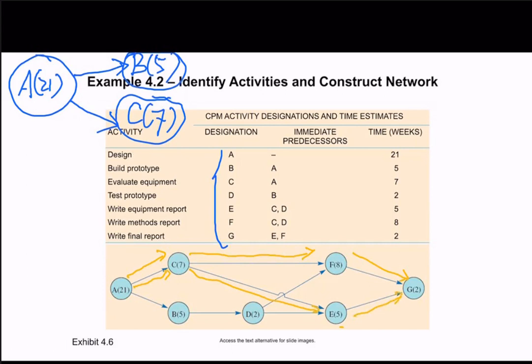And we also have a path for A to B. If we are not going to C, we go to B, and from B to D. And for D, we have 2 paths over there. So actually we have all the 4 paths here. So what is the critical path, which is the longest path?